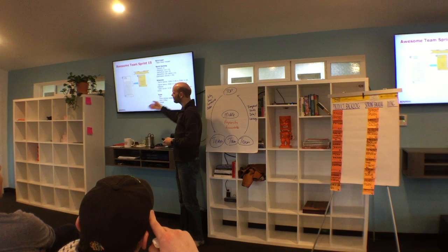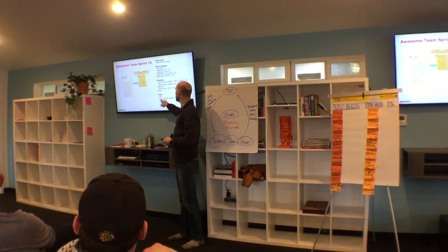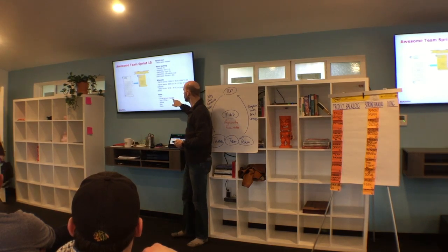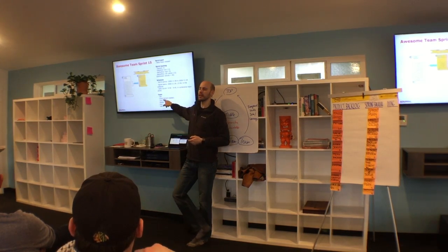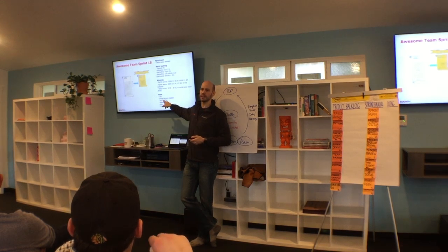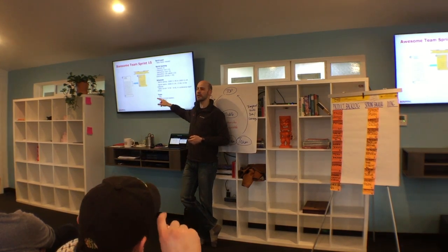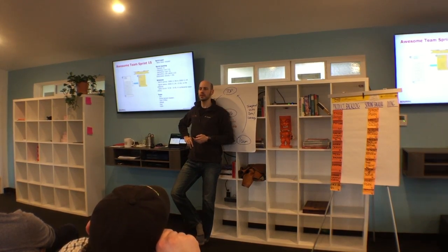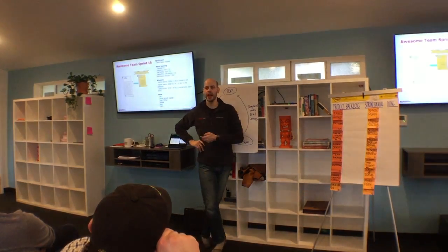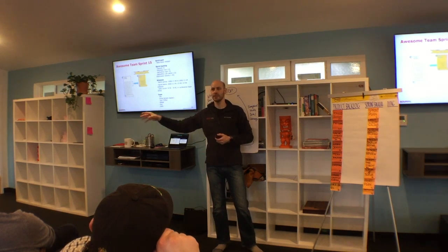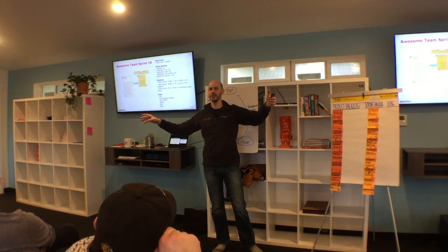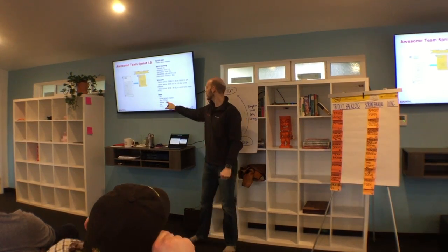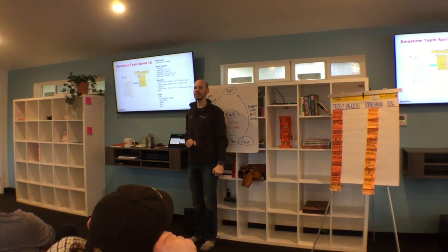Then they write the team members. They wrote Jim, Erica. Erica is currently playing the role of the Scrum Master. Tom, and they have an impediment here. Tom is allocated to 2 projects. He's told he's on this project 75% of the time. If he's told he's on another project 25% of the time, we know that doesn't actually mean he has 25% of his time there and 75% of his time here, because there's context switching loss of 20%. So they know they're not going to get all of Tom that they wish they could.